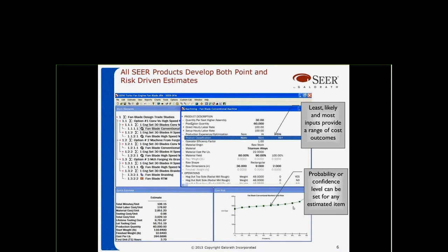So once you point that out to management, they'll know the maturity of your estimate, and they'll also be able to pick a confidence level so that they make the decision on how much risk the organization is going to take going forward with the estimate as it is, or they may send you back to update it or try to get more engineering information or whatever is lacking in order to put a flatter line and a more mature estimate together.